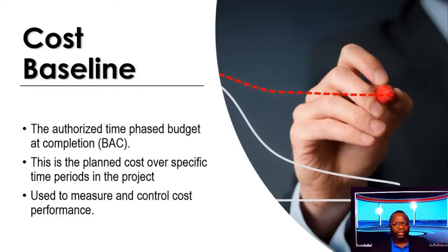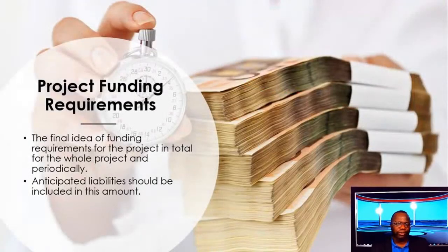For you to really know what the cost baseline is, you're thinking about the time-phased budget at completion. Because if you don't phase out your budgets, your cost baseline or your BAC, how are you going to measure performance? Okay, so keep that in mind, very important.